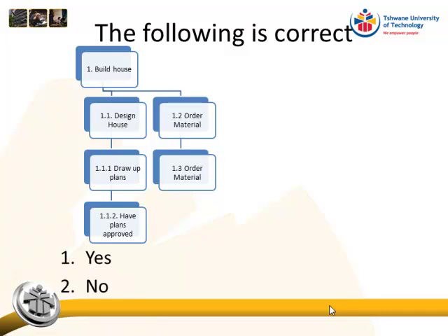Because one of the rules of a work breakdown structure is that a parent, so the parent is the top item, should not have only one child. Okay, because that's when somebody with OCD has drawn up the work breakdown structure, because they've just wanted to break it down to the same level as whatever else is broken down to. Okay, so 1.3 not required. Right, what else? Or do you think there is anything else wrong?